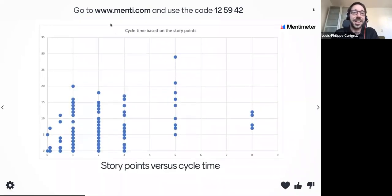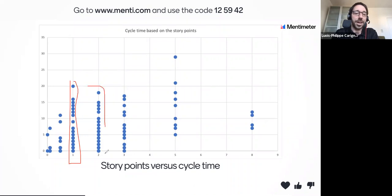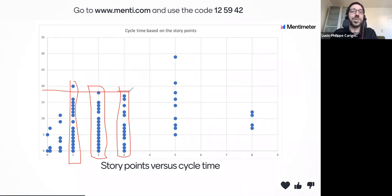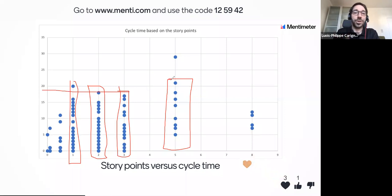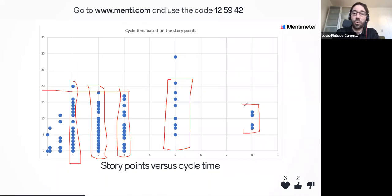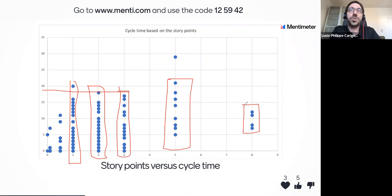In 90% of teams I've worked with in the last three years, one-point, two-point, and even three-point stories are all about the same cycle time value. That distribution where my one-point is anywhere from zero days all the way to 20 days — it just happens on any scale, two points, three points. And if you look at five points, it's also in that same range of five days all the way up to around 20 days. Even more surprisingly, my eight-point stories are also within that 20-day range. That makes me wonder: am I getting the right value from those story points?